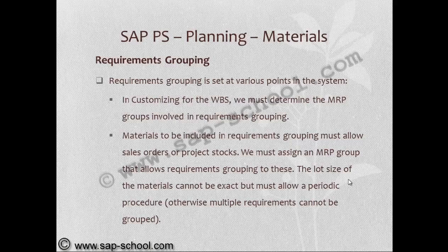Materials to be included in requirements grouping must allow sales orders or project stocks. We must assign an MRP group that allows requirements grouping to this. The lot size of the materials cannot be exact but must allow a periodic procedure.